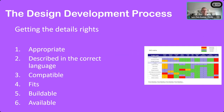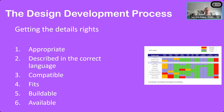When we get a design through at a very early stage, we should be isolating for each detail: Is it appropriate? Is it described in the right language? Is it compatible? Can it fit in the space? Is it buildable? Is the product available to buy? We see failures on all of those in the disputes we observe on construction sites. We've been recommending a red/amber/green process. Red means there's no solution available — you've just designed something with a skyhook. Amber means it might be all right but needs more scoping; it may require additional testing or a fire risk engineer to review it. Green means it's clearly within a manufacturer's system and easily priceable.